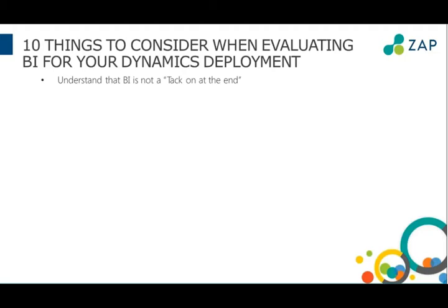In general, the ecosystem of Dynamics is well tested and has been shown to be very good at suggesting to all the customers that buy an ERP or CRM product, don't worry about BI, it'll be fine, let's get this deployed and then we'll worry about BI at the end. The problem is that for most of you, when you deploy an ERP or CRM product from Microsoft, you're actually making a reasonable amount of changes in that product, and as such, tacking it on the end will mean that you might just not hit the goals.